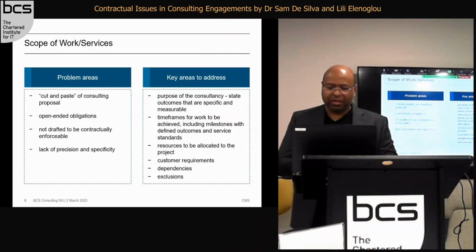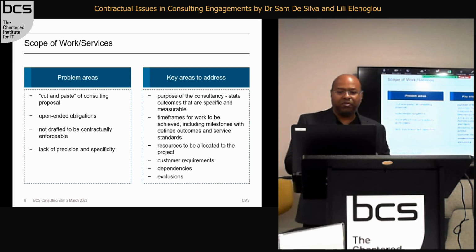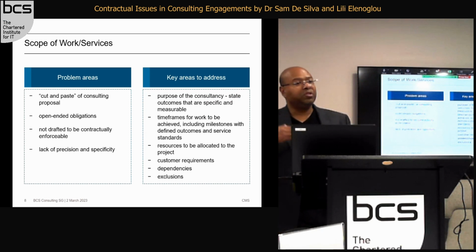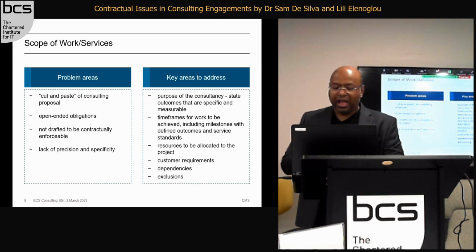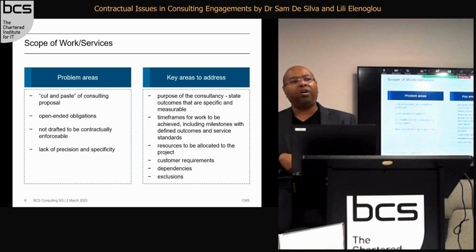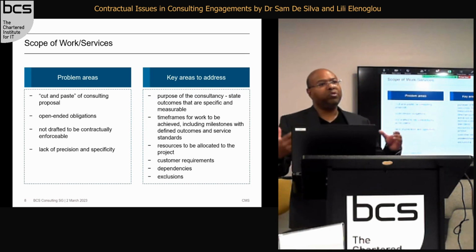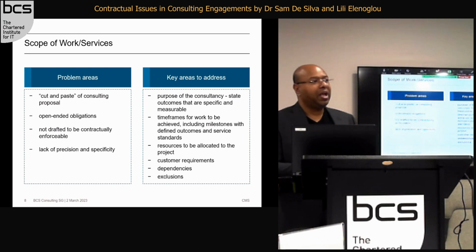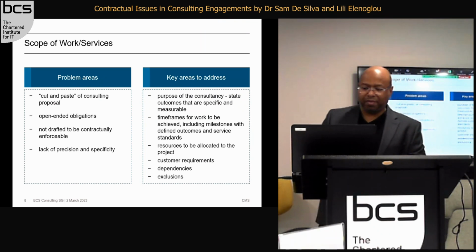So you should state the outcomes, which are specific and measurable. A person mentioned time frames. If you're putting in time frames, you need to make sure you include milestones there. What are the resources to be allocated? Then customer requirements. Often in these consulting engagements, you need the customer to do things. If they don't provide input or review your documentation, you won't meet the project milestone. So you need to specify their obligations, what they need to do as customer requirements.